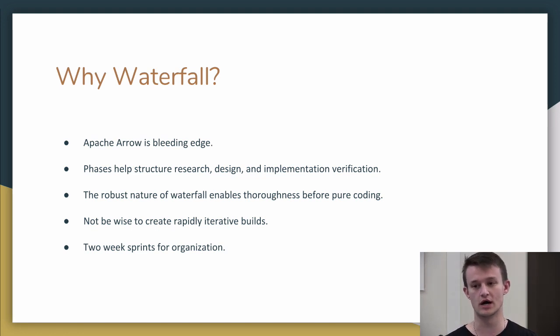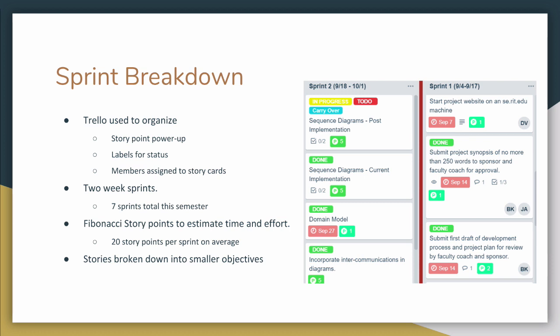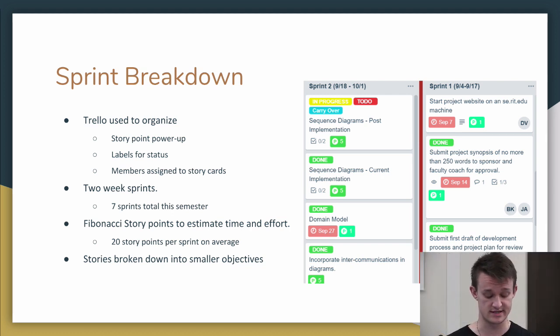Instead, we decided to opt in for bi-weekly sprints, where we would sit down and work through what kind of information we need to be researching, what kind of information we have to elicit from our sponsors, and other work-related tasks. And we did all of this using essentially a Kanban board. We utilized Trello and set up grouped sprints, where for each sprint we would specify how many story points are assigned to the assignment, and labels for status, so if we need information from a teammate or from our corporate sponsors. And we used Fibonacci numbers for the story points. If we found that a certain task would reach more of the level of an epic, we would break it down further into more manageable chunks.